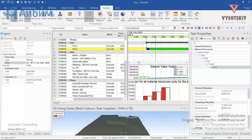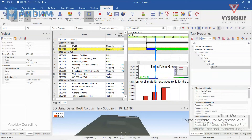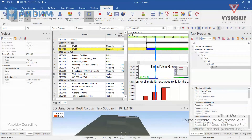So if we change our data date time to 9:01, we'll be able to update the current status of the activity. Under the task properties you can find your planned utilization along with actual utilization. Depending on this, Syncro would calculate remaining utilization along with costs for fixed units.